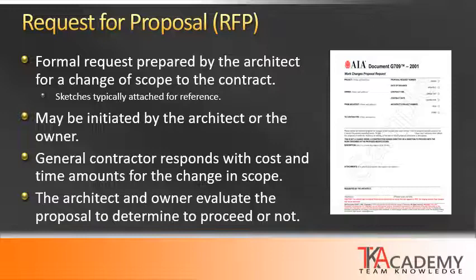It may also be initiated by the owner, and with the owner a lot of times it is specific changes in their intent or desire. They may come up with something new, or they may be under budget and looking to spend extra money and adding something to the project, and they will request that the architect puts together the request for proposals to price that out or add it to the project while it's still under construction.